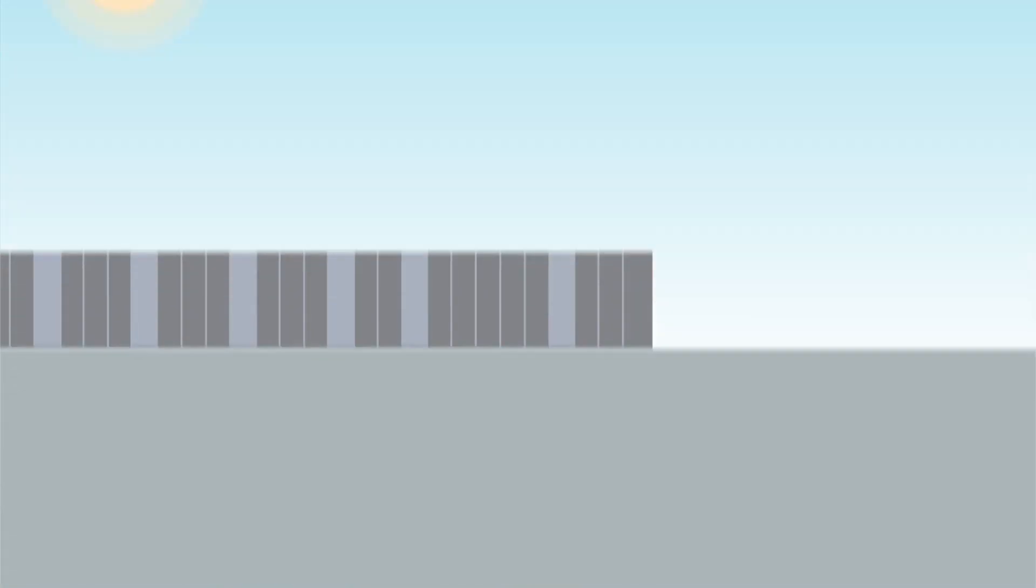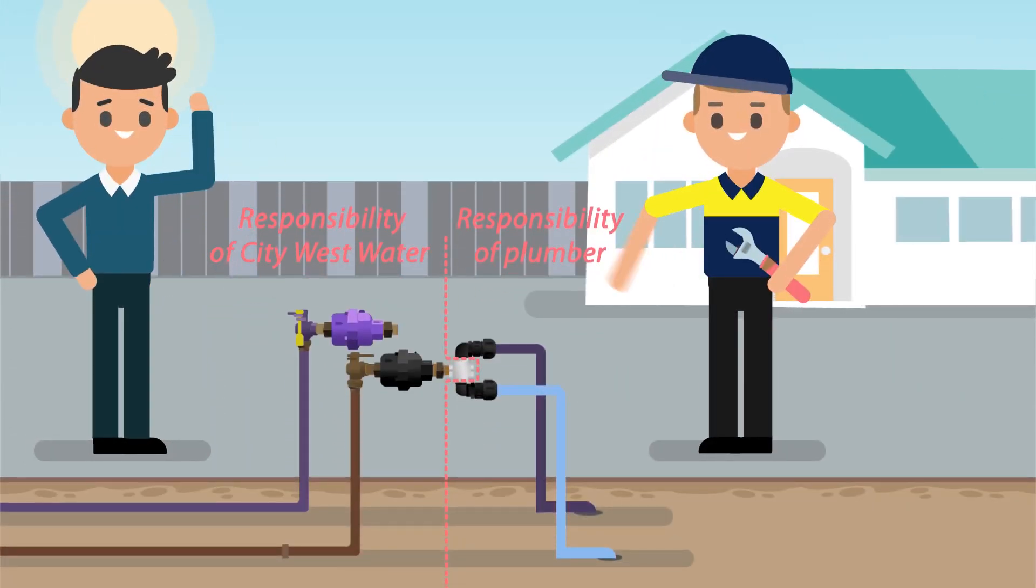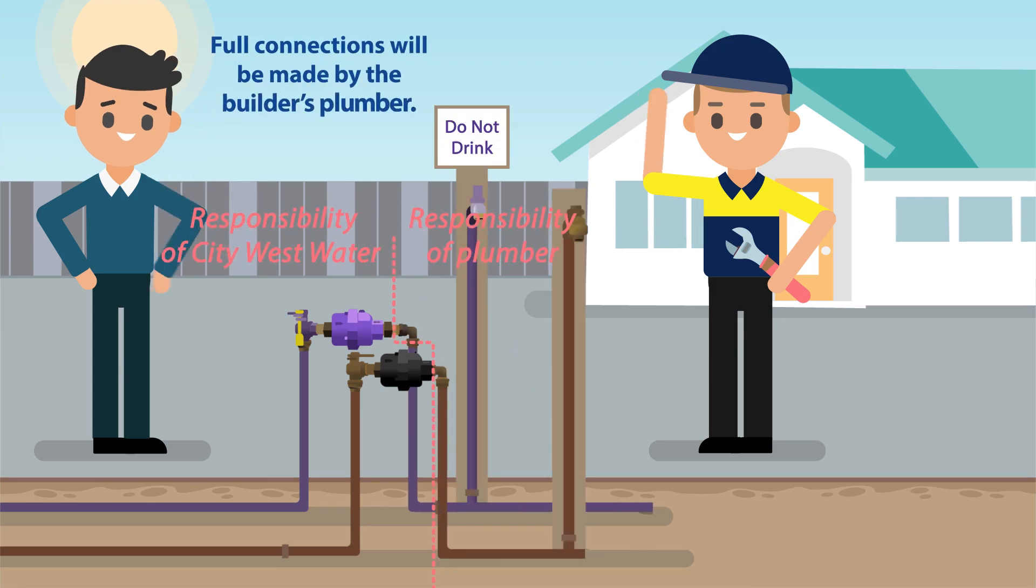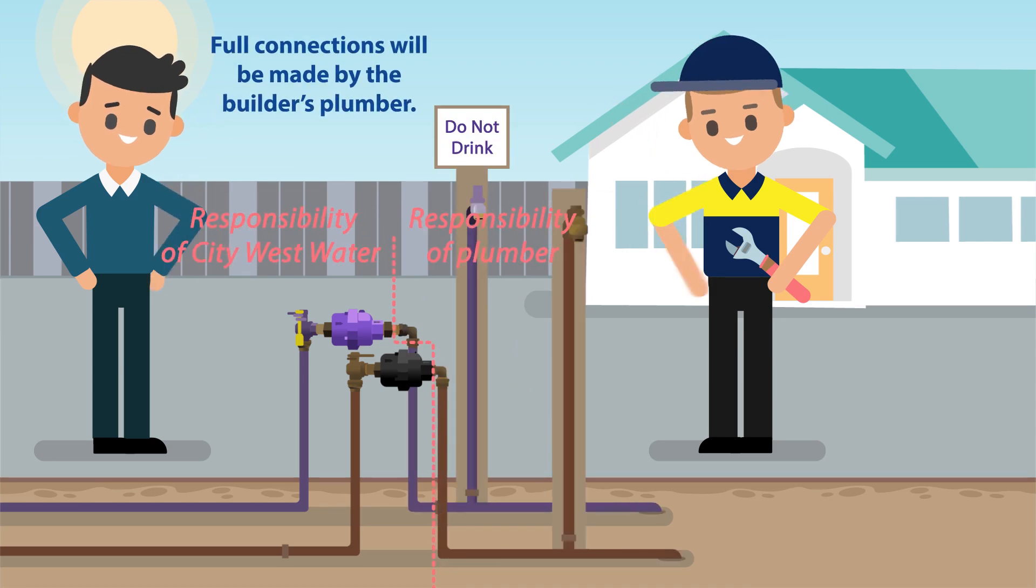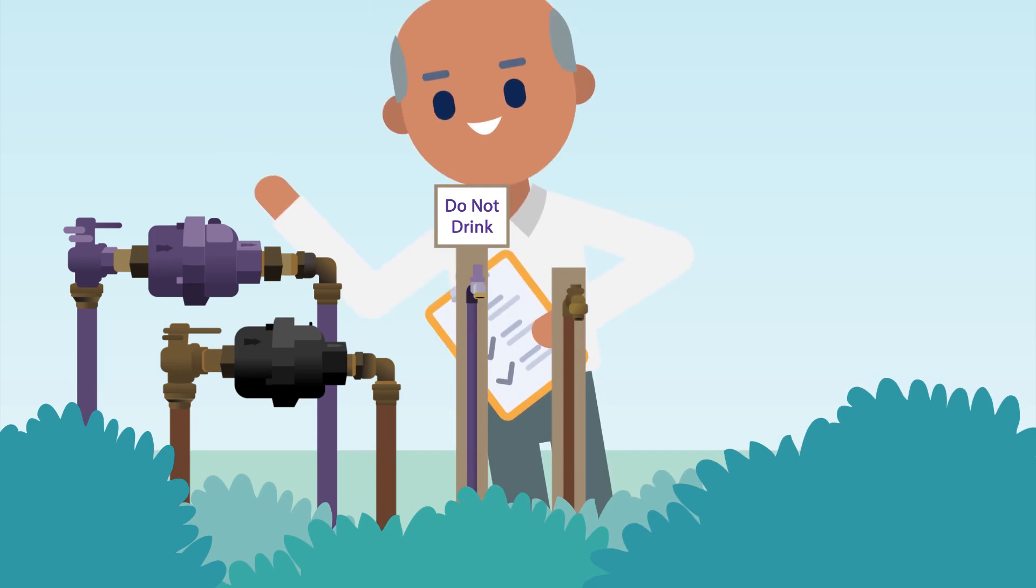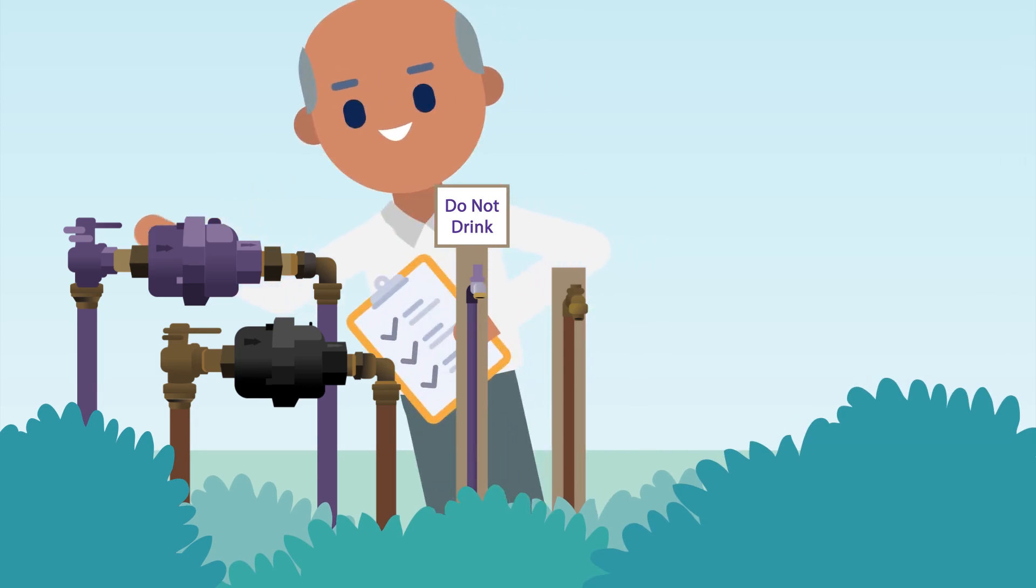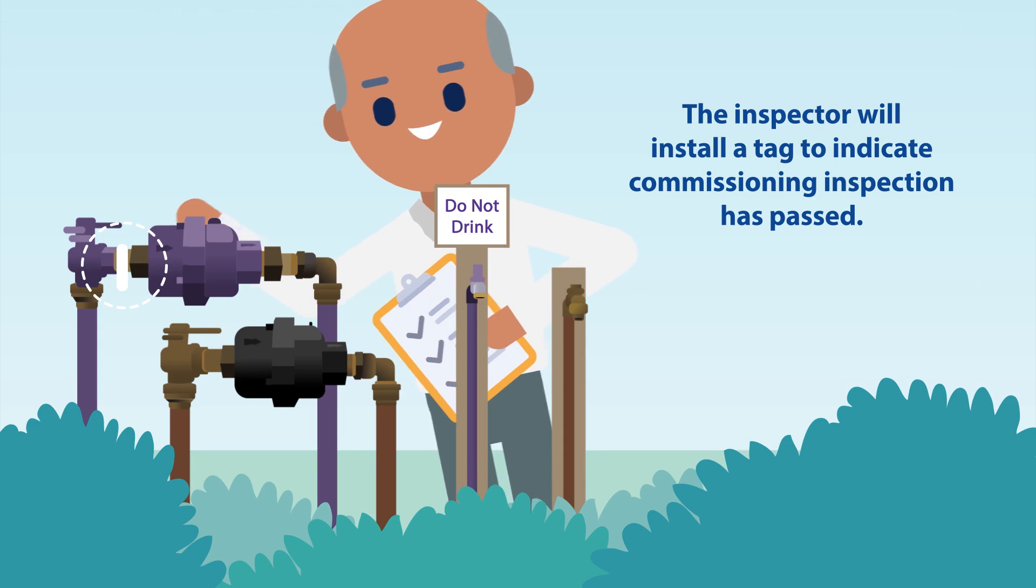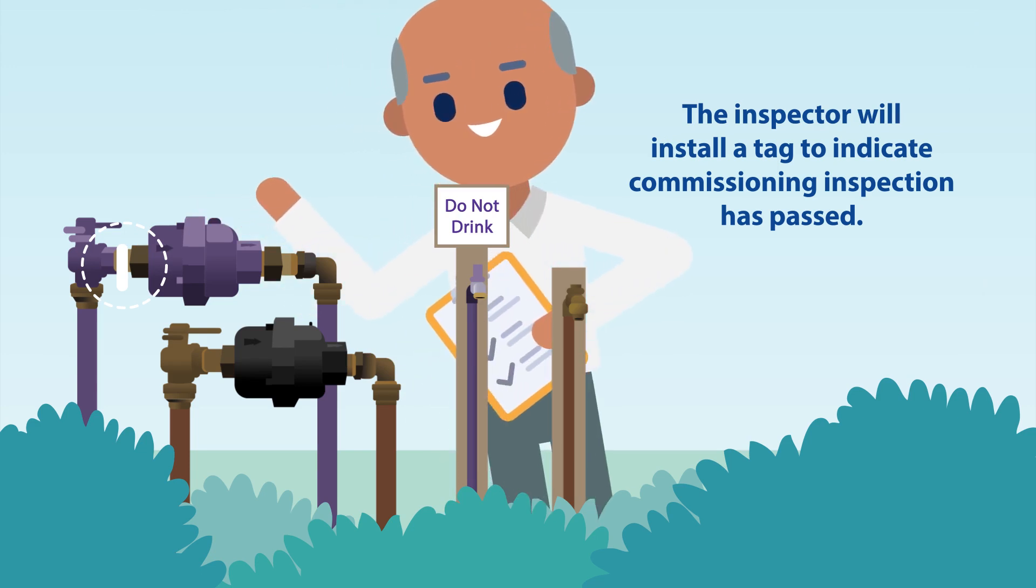Full connections including installing the tap upstands and associated plumbing will be made by the builder's plumber. Following the commissioning inspection with City Westwater, the inspector will install a tag to indicate the cross connection test has been passed. This later stage of connection nearer to completion of the house should help to prevent theft.